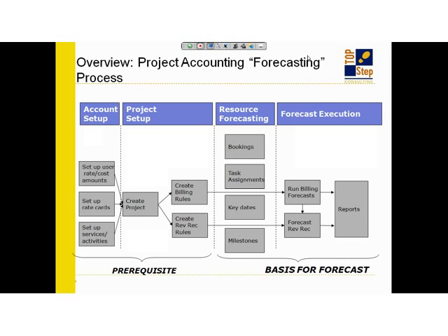But once you have that forecast of time, then OpenAir actually does this running of the rules and forecasting of the revenue behind the scenes in what's called the forecasting or charge projection functionality. So OpenAir takes care of running the rules on that forecast time, and it populates a series of fields that are specifically called projected something in order for you to do forecasting on reports.